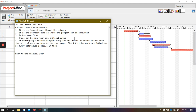The fourth characteristic of the critical path is that there can be more than one critical path. So if I change the bottom path A, D, G, H and add an additional day to D or an additional day to G, what happens is then I've got more than one critical path. If I add two days to B or E, what happens is that I'll have now all the paths be critical. So at the bare minimum I'm going to have one critical path, but I can have many more. In this case, because I've got three total paths possible, I could have a minimum of one critical path and a maximum of three. So the number of paths on the diagram is the limitation of how many critical paths are possible.